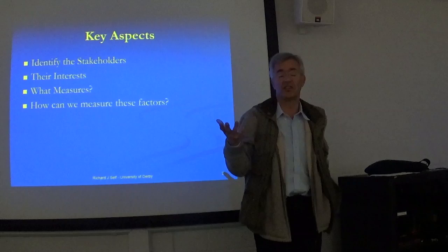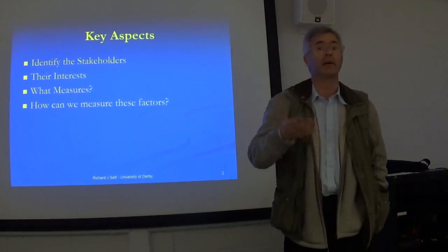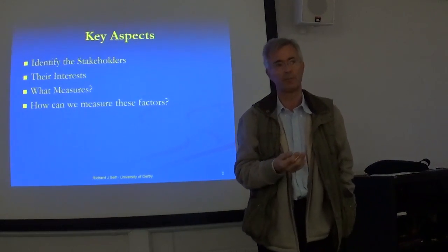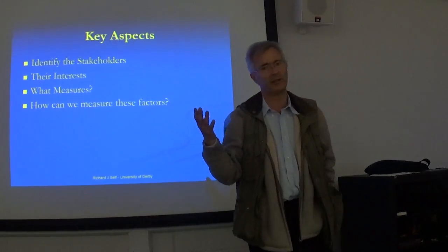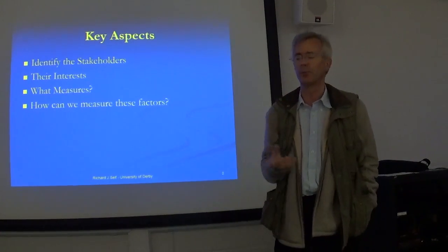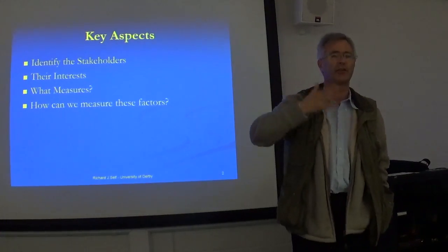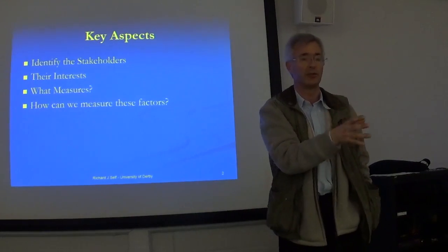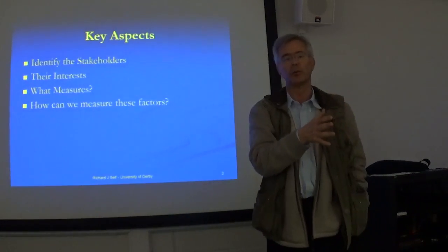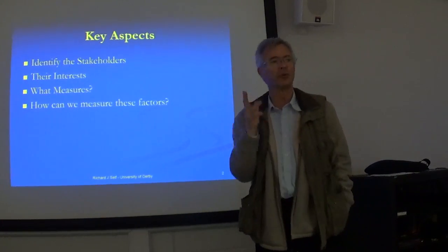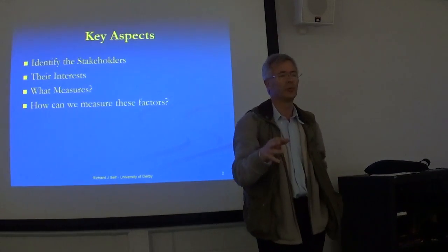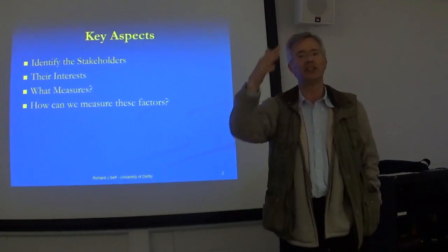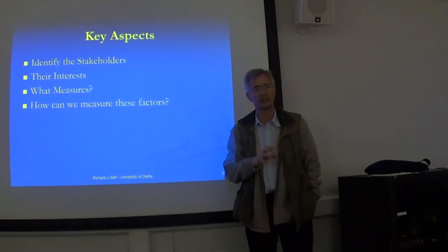Yeah, I mean, it's interesting you say that because that is a critical area. Have we done a proper test run with proper amounts of test data? One of the problems is often, and if you look at SAP as a product that people implement in business, they have a 3 or 4 tier process. They start in the development environment, try and get it as good as possible there with small amounts of sample data, move it into a test environment, maybe a pre-prod environment, and then into production. There's sort of staged releases through that, through the change management process.